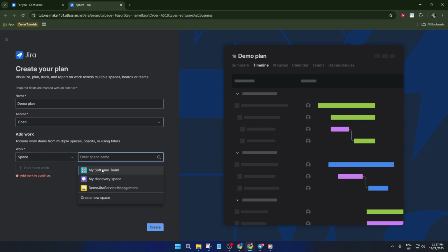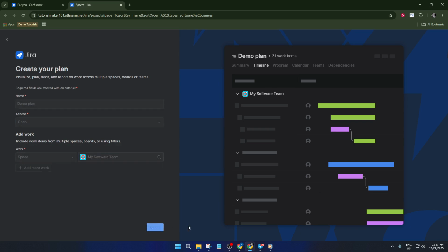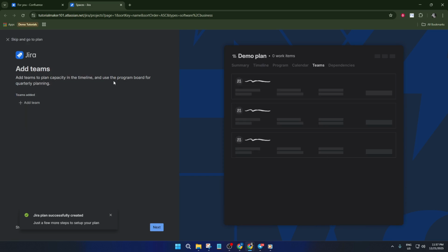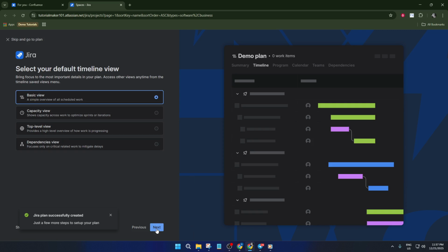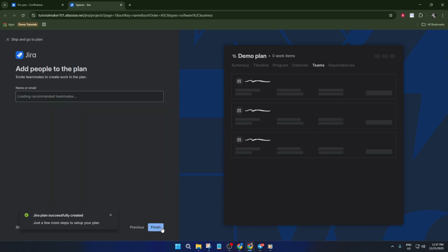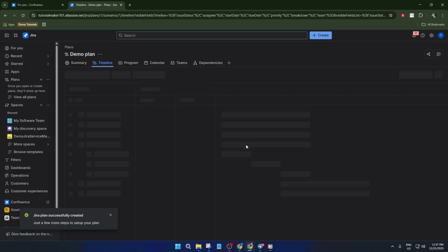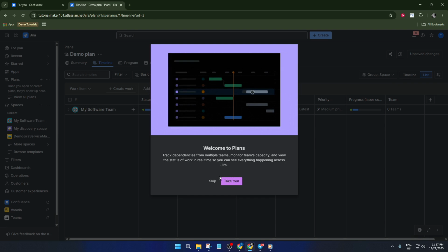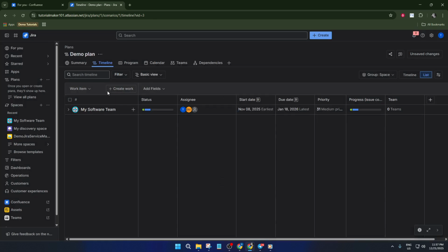Before you get too deep, take advantage of the Settings tab to configure your plan. Here, you'll set your preferred scheduling granularity: hours, days, or story points. There's no one-size-fits-all. If your team estimates in hours for design but uses story points for development, match this to your team's reality. Also, choose your date fields for start and end. This ensures the roadmap aligns with your actual workflow, not just default fields Jira sets up. Don't rush here. Getting this right up front avoids confusion about timing expectations later.